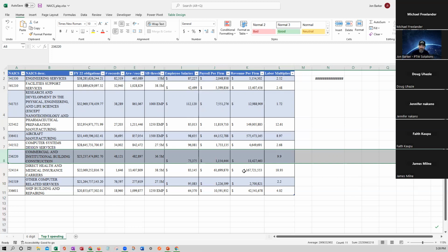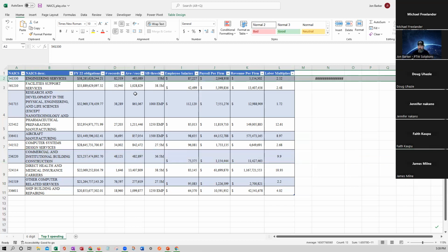I'm paying $130 an hour for this. How do I get to that $130 an hour? Well, I'm going to use a 5.4 index of wrap rates. And then I'm going to have to pay this person $125K a year. 125K divided by 2080 is $60 an hour roughly. So I can be fair and reasonable at $150 an hour. I would go further into that.